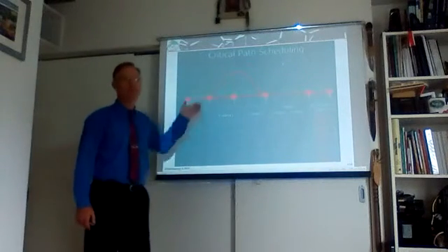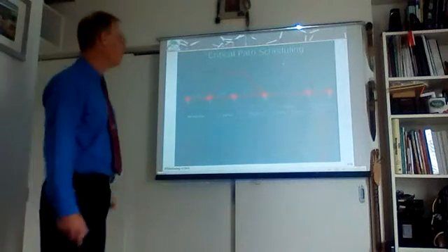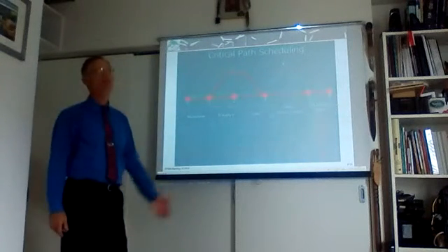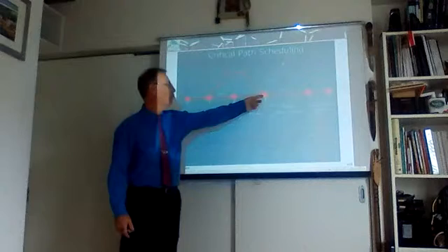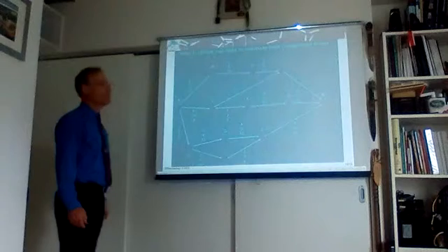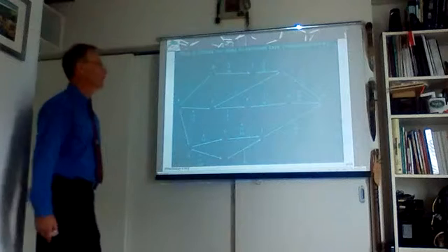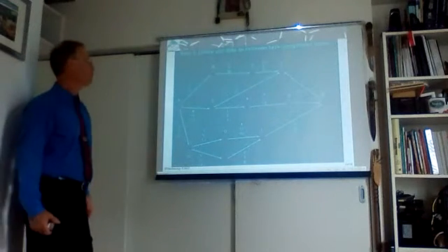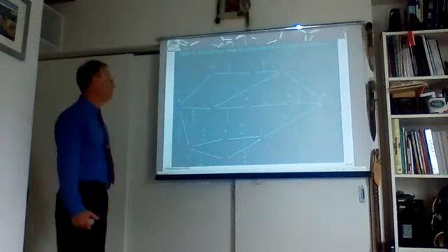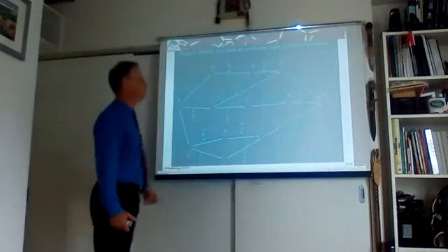The critical path is the path that doesn't have any slack time. So we don't have to wait for another job to complete, and we can continue right after completion of the first task into the next task. This is a more complex description of a job. Many tasks are happening and taking place between the starting point and the end point.